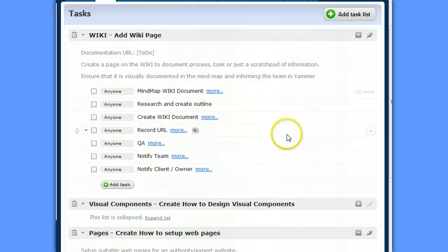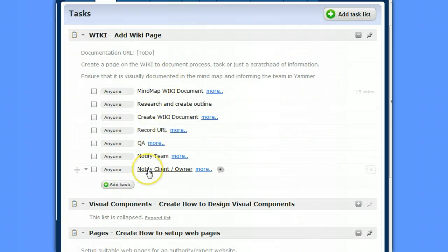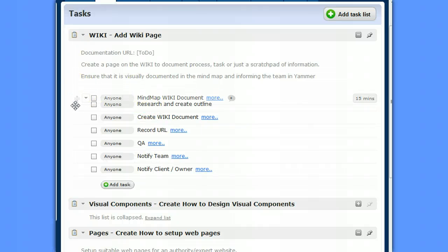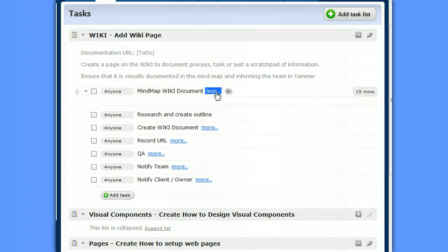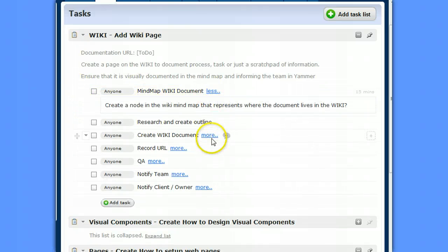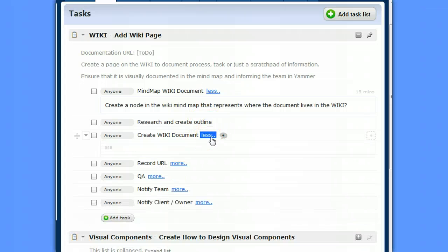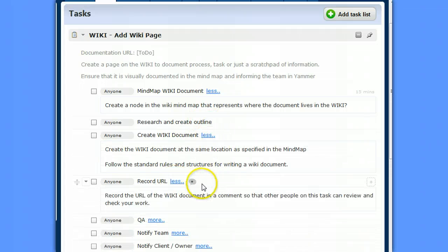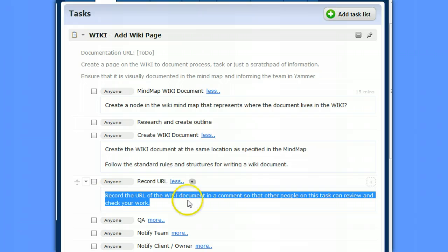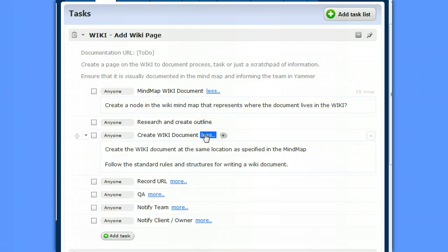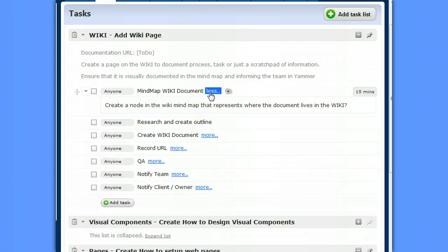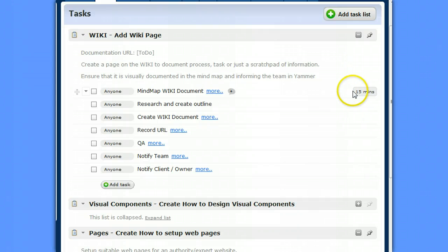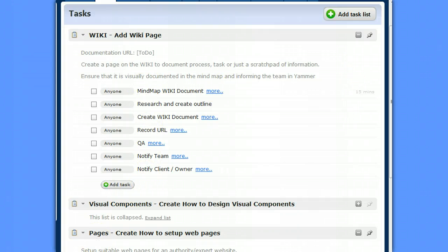So I've added in all of those items as tasks in the order that they were in. You can drag them if you need to. I've given each of them a description that makes sense for the tasks so that when the person is working on it, they know exactly what they've got to do.